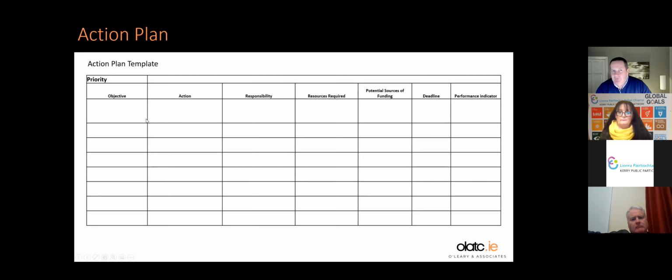And again, so they've worked out this action plan, just thinking logically in terms of what they need to do to hit their targets. So that's the blank template. You can add in more columns here if you want. You can put in budgets if you want. Say, okay, we've got a budget in place here. Put in projected budget versus actual budget. You can add in as many columns as you want.